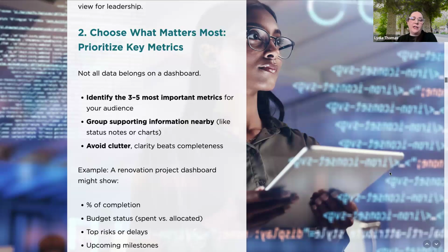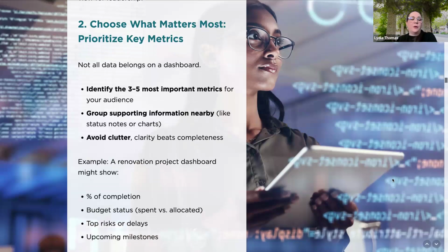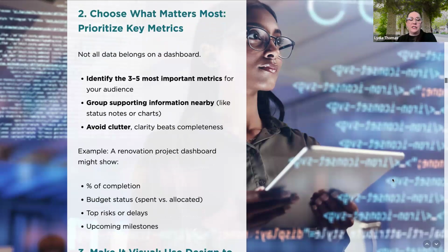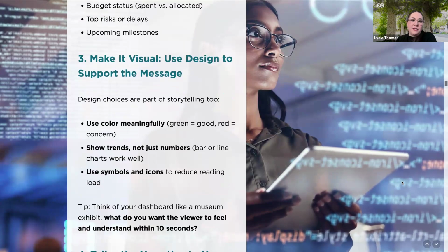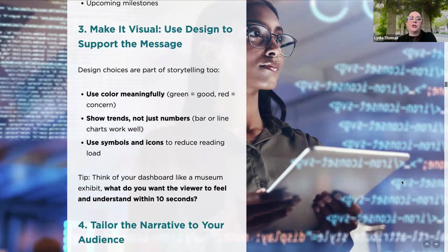So a renovation project dashboard might show your percentage of completion, your budget status, spent versus allocated, maybe your top risks or delays, or your upcoming milestones. And then number 3, make it visual. Use design to support the message. And so your design choices are a part of your storytelling. I think that's something that some folks tend to forget.